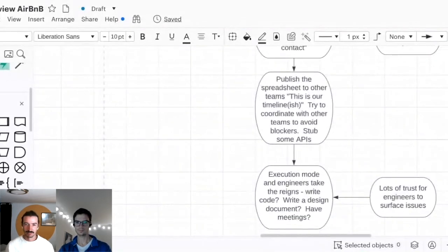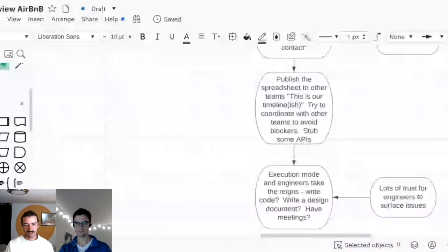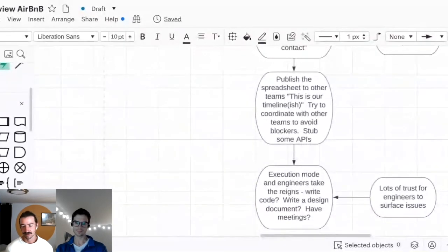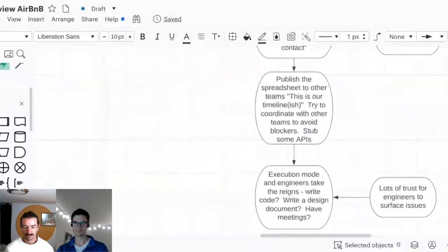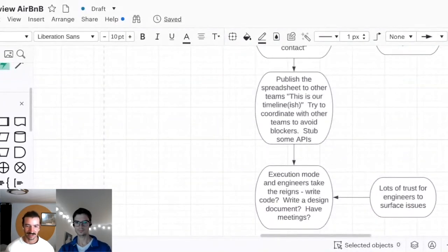So this was more just to handle the big projects, and people were just assumed to be able to handle the operational stuff themselves without any other prioritization. So yeah, I think the assumption was this is what you're going to work on, maybe realistically for senior engineers, 15 to 20 hours a week, and the rest of your time is other stuff.